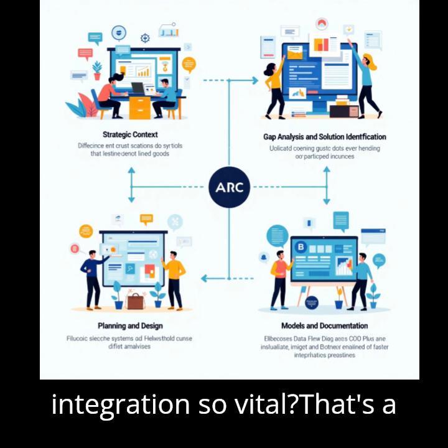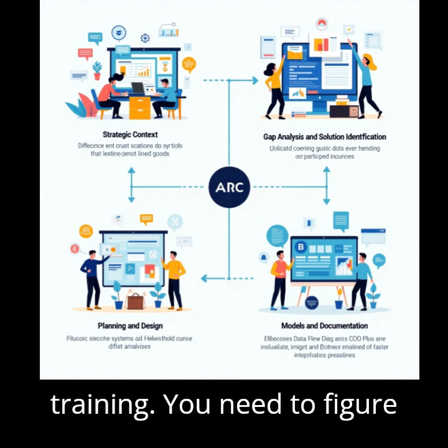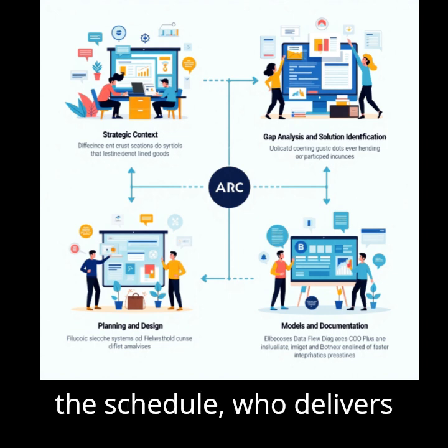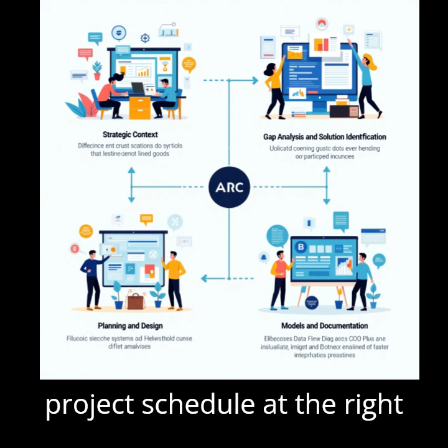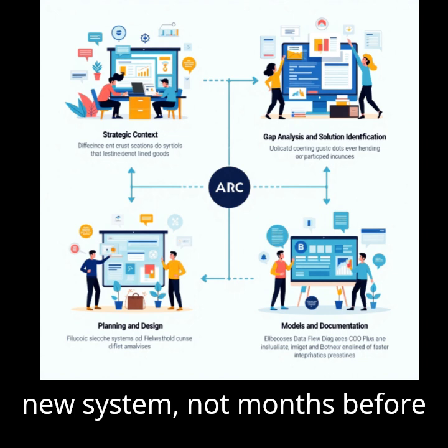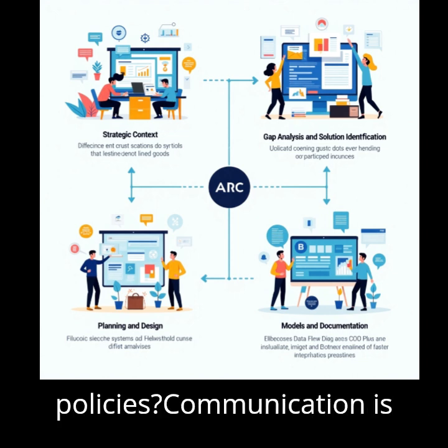Yeah. Why is that integration so vital? That's a really critical insight. Take training. You need to figure out who needs training on what, develop the actual training plan, the content, the schedule, who delivers it, and then slot that training into the main project schedule at the right time. Like, train people just before they need to use the new system, not months before or after. So timely training. What about communication and policies?